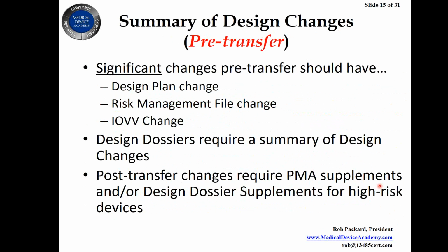So now you're going to have pre-transfer design changes. If you make a design change prior to design freeze, breathe a sigh of relief because you haven't spent all that money on verification and validation yet. So you should be updating your design plan because you had something go wrong, something failed, or you had a hiccup, and you're going to have to change your plan, and you're going to have at least a delay. You might have identified that this material that you'd hoped would work so well no longer is going to work with your sterilization process, so you have to identify compatibility with the sterilization method as a design input. Maybe you skipped that and need to add that as a hazard.